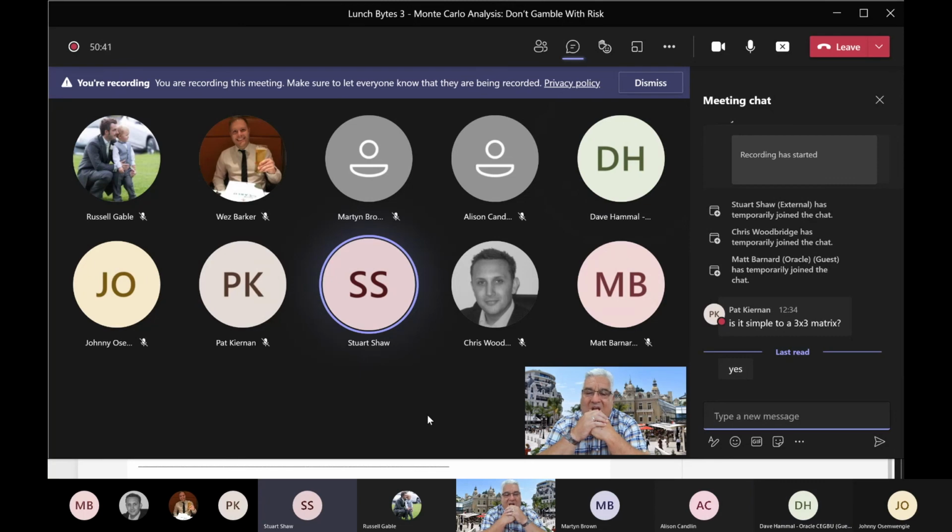Yeah. Could you use it by activity code as well? So if you've got an idea of what your areas of risk are, could you use activity codes to run the analysis by activity code, or is it just really activity types at the minute? So really, when you're running it, you need to be running it against the full schedule in order to get all the relationships and everything to be taken into account.